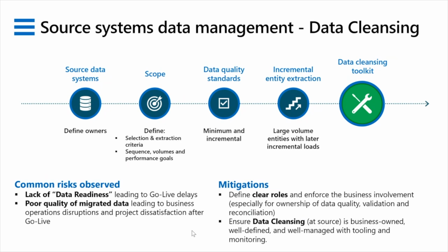And sometimes this is difficult because statements of work, etc., where the project says the data cleansing is a responsibility of the business. We as a project team are going to focus on delivery of the functional requirements. The partner's SOW is saying that we're responsible for delivering the designs and coding, and the data cleansing and the ownership of the data falls between the cracks.